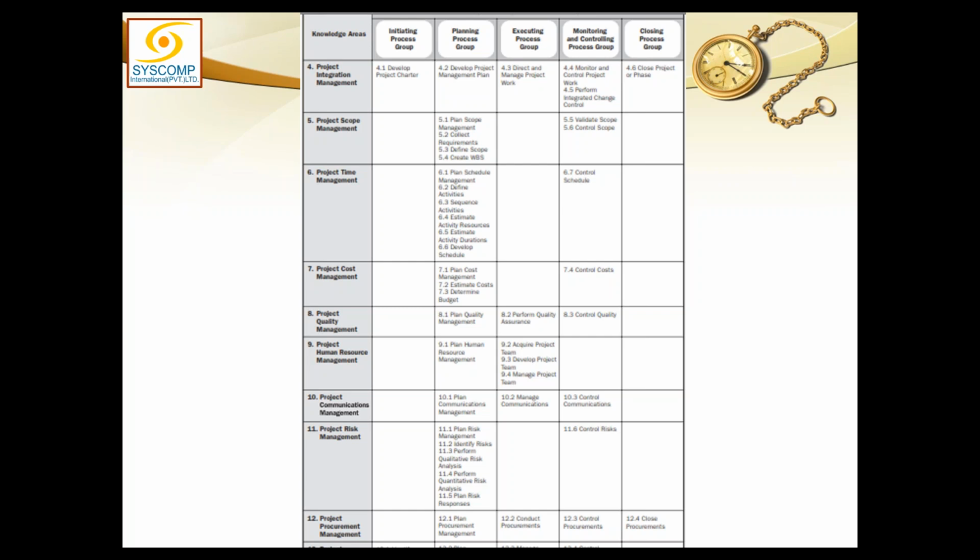As far as the stakeholders are concerned, as you remember in initiation, I said after you have understood the charter, you look around and you try to identify who all are the people who will be affected by this project, and you try to identify them, analyze them. This is called identify stakeholders, and that is in initiation because of its need. In planning, we will develop a detailed project stakeholder management plan. In execution, just like in communication, we will manage these stakeholder engagements, and in monitoring and control, we will control these stakeholder engagements.